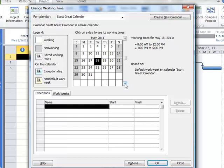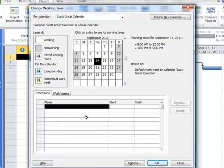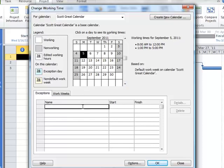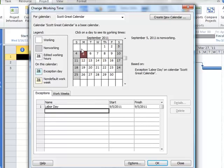For example, I know that later in the year, the first Monday of every September, September 5th, is going to be Labor Day. So I can simply type in Labor Day to my exception list here, and Labor Day is now a non-working day.